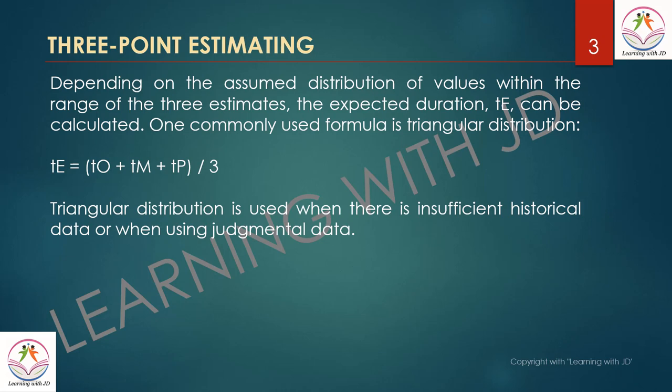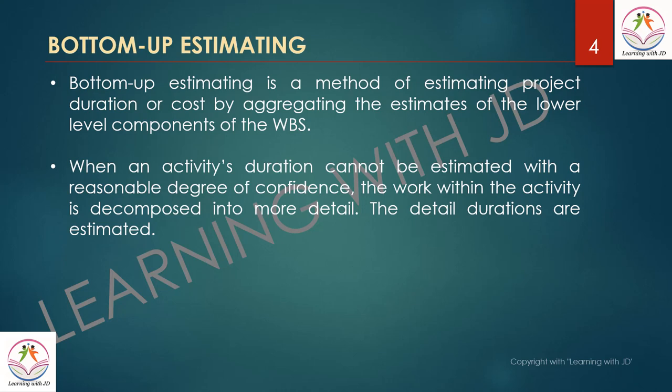The last one is bottom-up estimation. Bottom-up estimation is a method estimated as the planning of the project progresses, and it is the most accurate. You plan the project activities at the lowest level — say at the WBS (Work Breakdown Structure) level — and then you aggregate them to come up with an estimate. For each activity you will know it takes two days, three days, one day, etc., and then you add all that to come up with an approximately accurate project timeline.